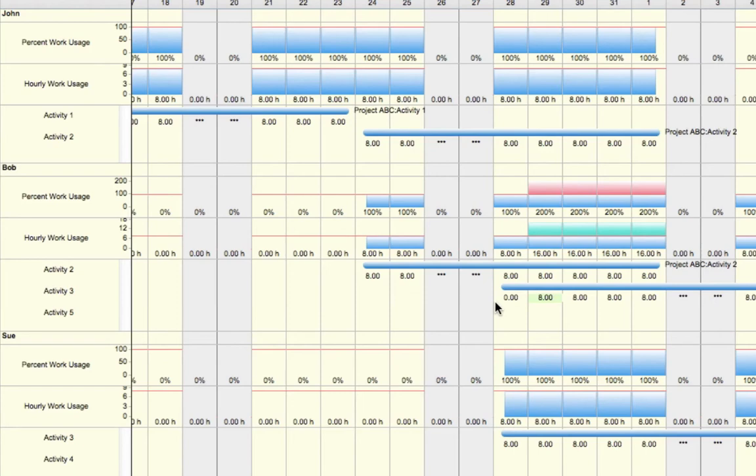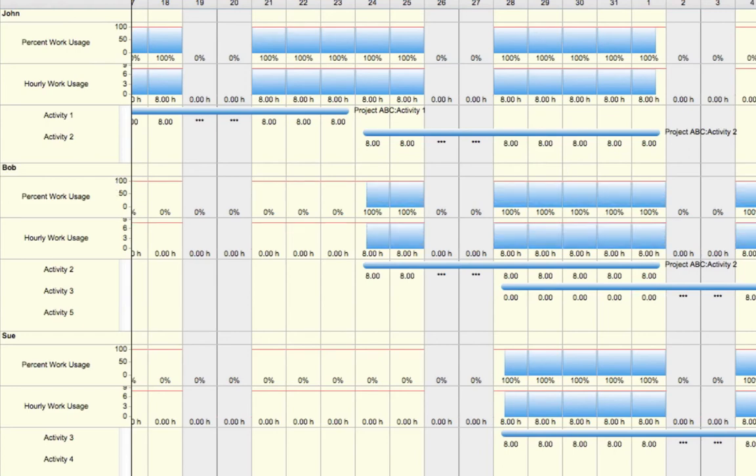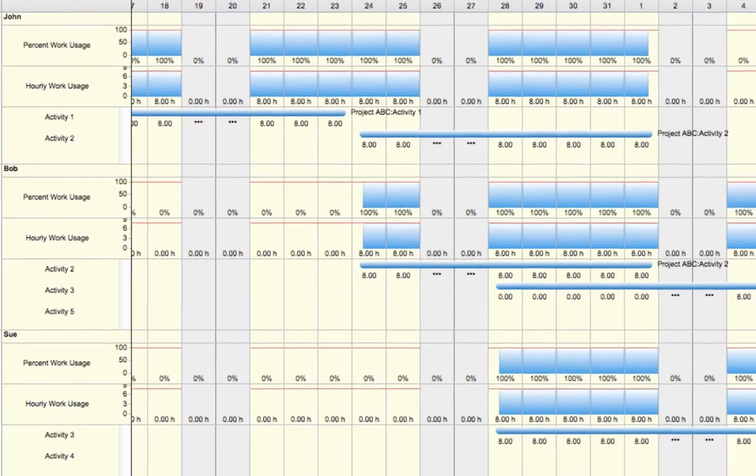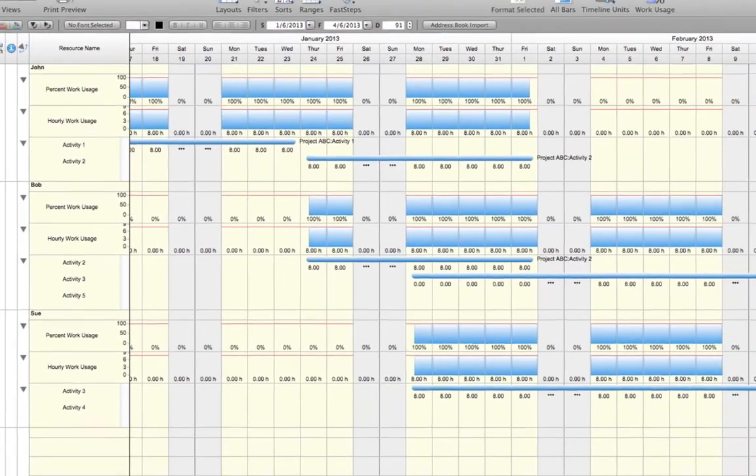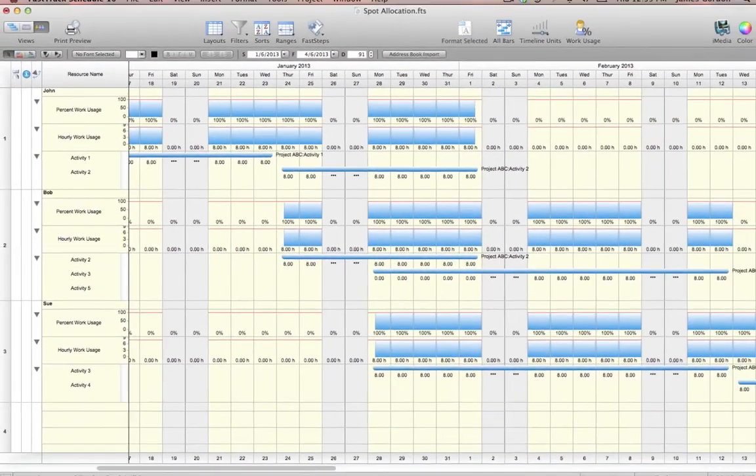As we continue to do this across the task, we'll notice that each day once again updates. But when we reach our final day, Bob no longer has any over-allocations. So his graph above once again redraws to show that he is at 100% across all tasks that he is currently assigned to.